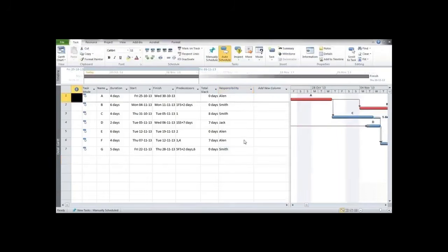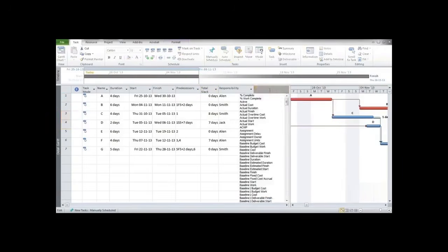Like Microsoft Excel, Microsoft Project 2010 also has capabilities to use conditional formatting using functions such as the IF function and the switch function. So to begin with, we would be starting to learn the IF function first. Suppose wherever there is 0 days slack, you want to display over here critical activity. If slack is equal to 0, then display critical activity, and if slack is not 0, then you display non-critical activity. So first of all, to start off with, we would be required to insert a column named text.